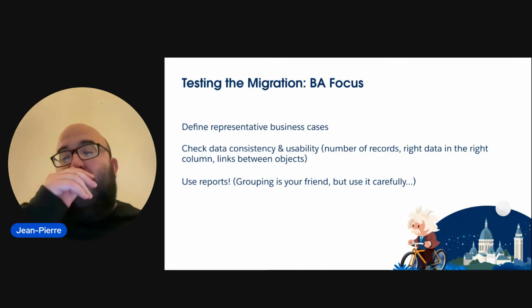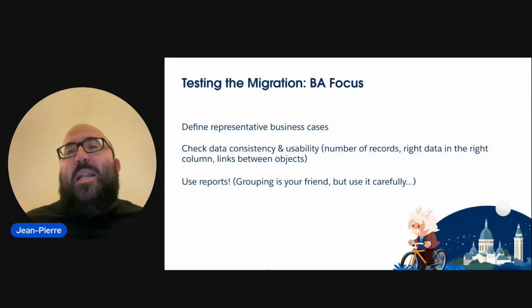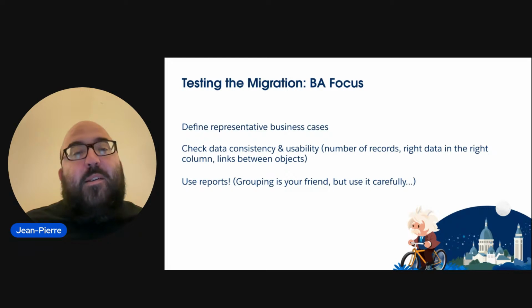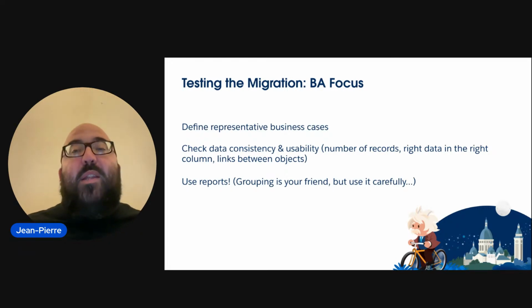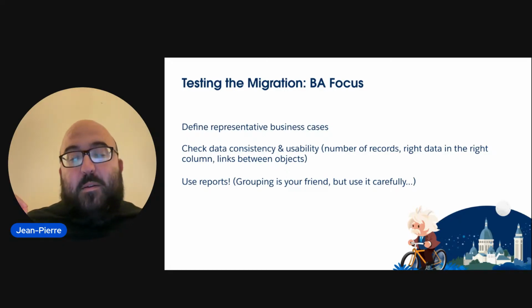And that's because even though the import was very smooth, was very successful, there was actually an issue with the format in the tool that we used, which made it that we could import, but we didn't have any value in those currency fields that we use on amounts for opportunities. So obviously, not useful at all for users. And so we had to redo that in the light of that test that we did. And so if you want to use those reports, please do that.